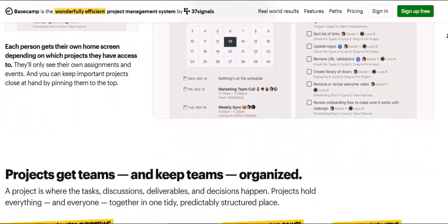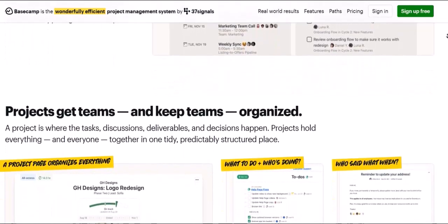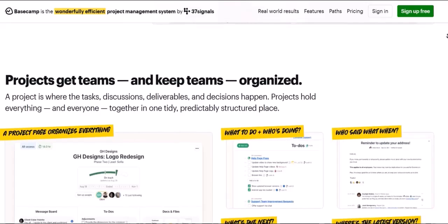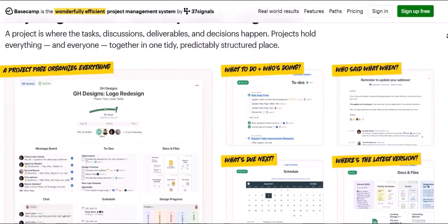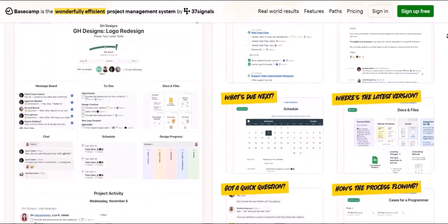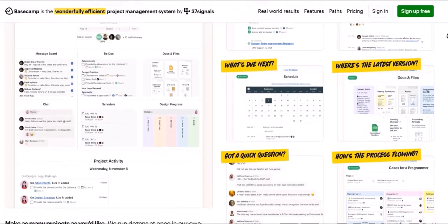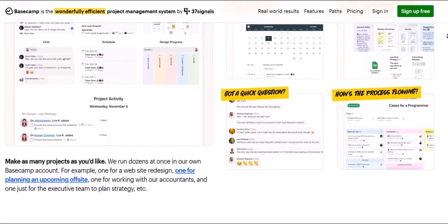Climbing the left side means you're figuring things out, research, planning. Reaching the peak means you're building or doing the work, and descending the right side means you're tying up loose ends and nearing completion. This isn't about specific dates, but about where you are in the journey and the confidence level in completing the work. It helps teams understand if they're still in the fuzzy ideation phase or well into execution.